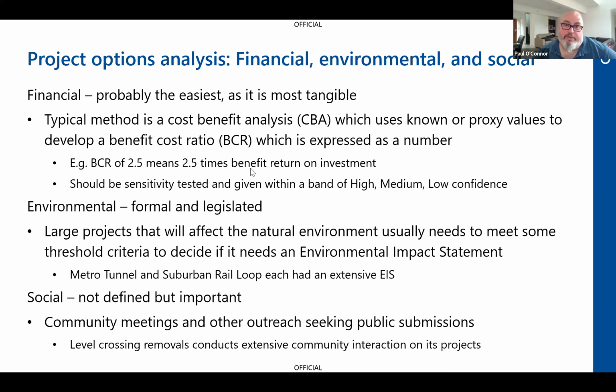So they're going to have to raise the wall by another 1.5 metres, which was not in the original EIS. With the big floods we had in Maribyrnong and Essendon a few years ago, there was a lot of controversy around whether Flemington Racecourse had triggered that. It's in the vicinity of that. Now there's a real question mark, particularly with global warming and concerns about more intense rainfall.